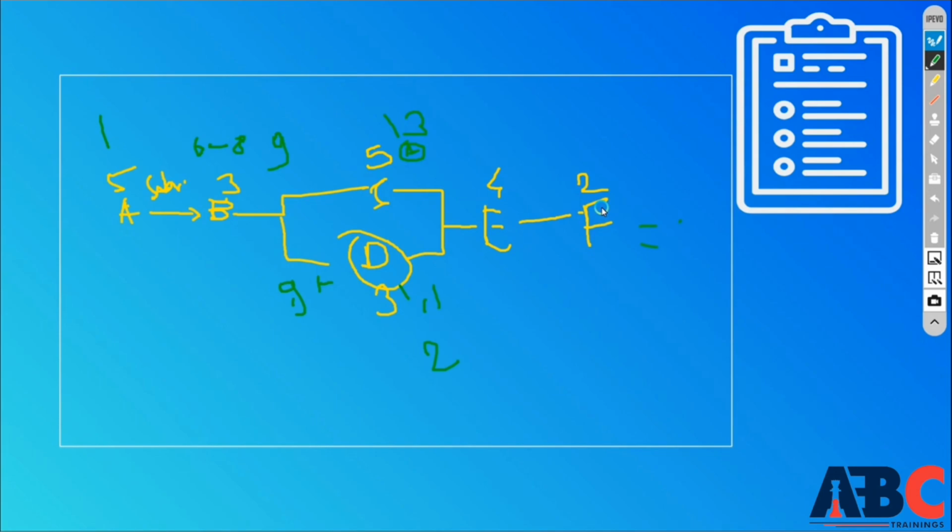Now, if the activity starts on the 10th instead of the 9th, then it will end on the 14th. But on the 14th, you have to start the E activity. So the activity ends on the 14th and the next activity starts on the 14th. So you will get no gap in this. This will be 0, because in this activity you don't have free float available.